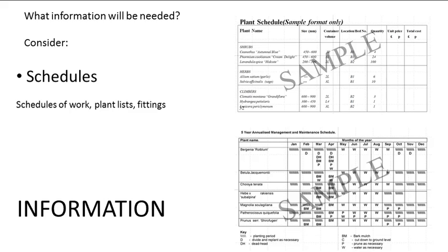You have to remember that contractors are busy people. If they have a lot of work on, they may feel it's too much trouble to calculate the materials required for a job, and the designer may struggle to find contractors willing to submit a tender unless a bill of quantities is supplied.